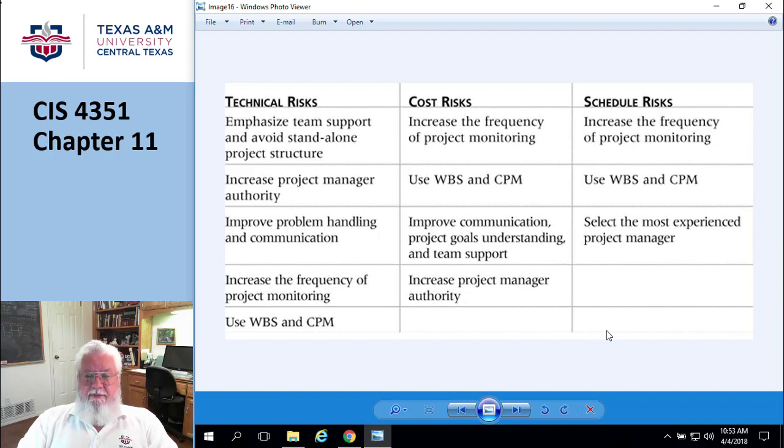Controlling risks on page 454. So basically, we're talking about the tools that are available to monitor these things, because I mentioned that risk will change over time. So risk measurement, right? Some sort of risk audits would be a good way of doing it. Variance and trend analysis, for example, if an EVM value goes above or below something, that's probably one of those triggers when we talked about that risk registry, what the triggers were.